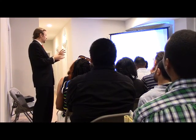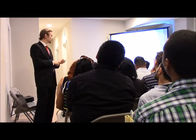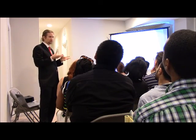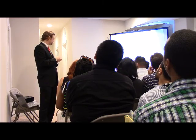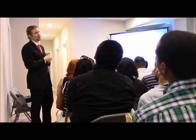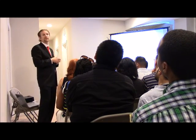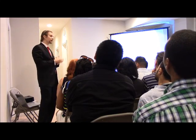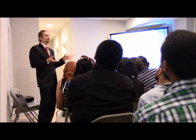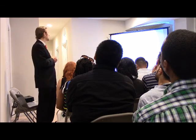And then again, we're getting bids while this is going on for the insulation, drywall, and tile. You can bring in people to do different bids of different parts. Like insulation, some guys might even be able to bid it right off the plans. They look at the plans, they can bid it out. Some contractors need to actually come out to the house once it's framed up to give you a bid, depending on the level of sophistication of that sub.